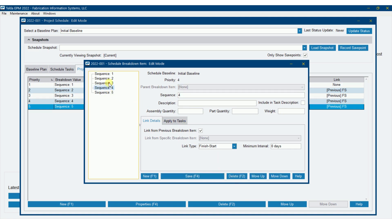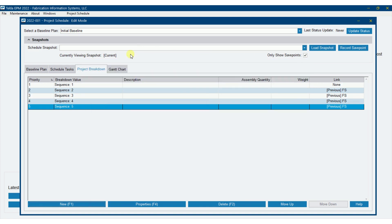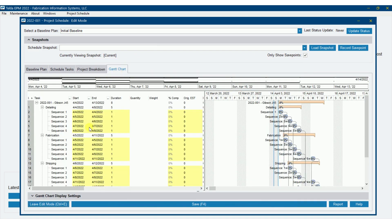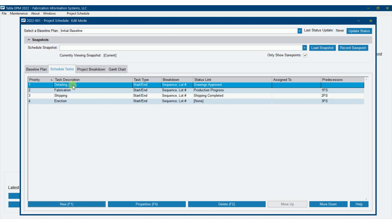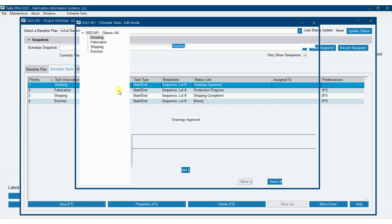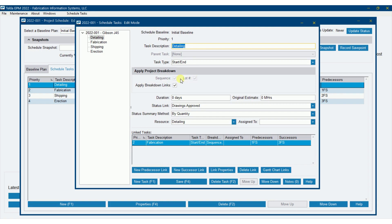Now if we go over to our Gantt chart, we should see that every scheduled task has sequences underneath it. We've got that under detailing, fabrication, shipping, and erection. Remember, on the schedule tasks I had chosen to apply breakdown to detailing as well. Note also that the breakdown items are grayed out once you set that up.